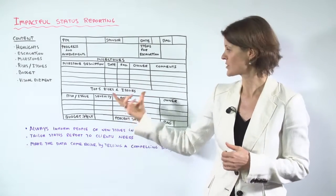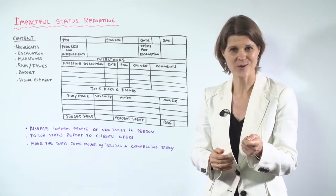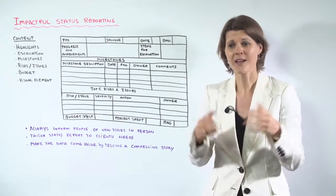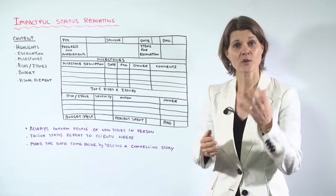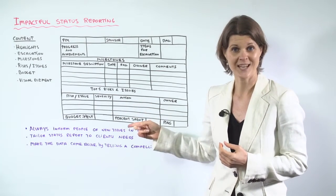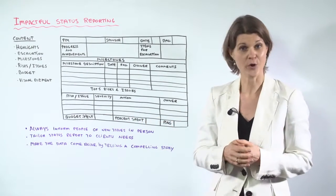And at the bottom here we have the top five risks and issues. Again, your stakeholders want to know what's really going on in the project. What are the real risks and issues of the project? So raise them here, but always tell them what action you are taking to address these risks and issues. And again, who the owner is.